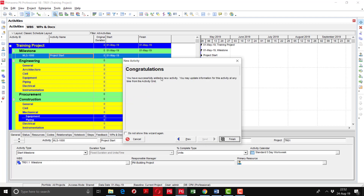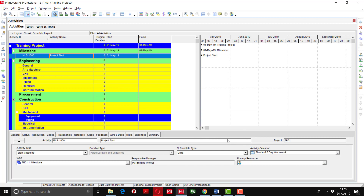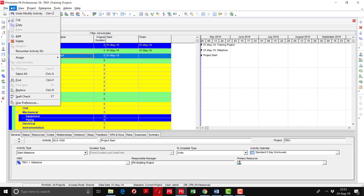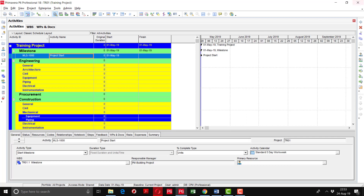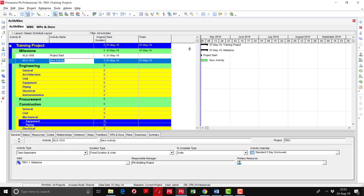The new activity has been created. Using the Activity Wizard takes a lot of time per activity, so if we have thousands of activities it will cause significant delay. To avoid this, uncheck the Activity Wizard. Go to Edit, then User Preferences, go to the Assistance tab, and uncheck both the Resource Wizard and Activity Wizard, then click Close. Now when you add another milestone, the wizard no longer appears and activities are added with an increment of 10 units.